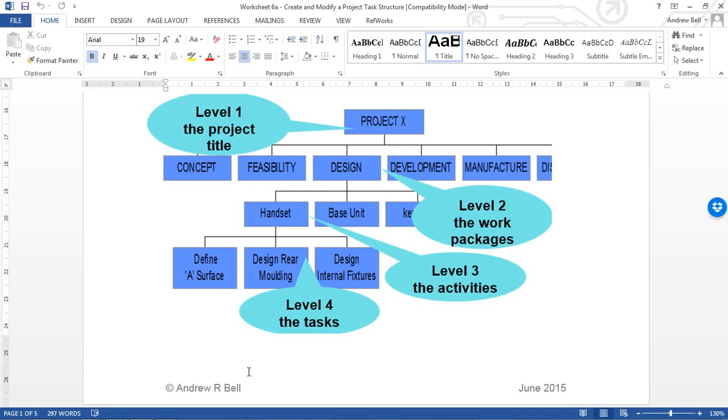These are my level twos or the work packages, sometimes called work streams. In this example, I've split the design work package down into three separate areas: design of the handset, design of the base unit, design of the keypad. These are my level three, I call them activities. And at level four, I've got the bottom level tasks, the things that are verb nouns. In this example, I'm only showing them for the handsets where I've got to define the A surface, design the rear molding, and design the internal fixtures.